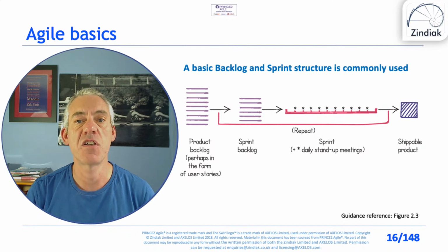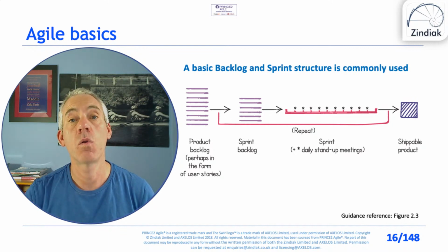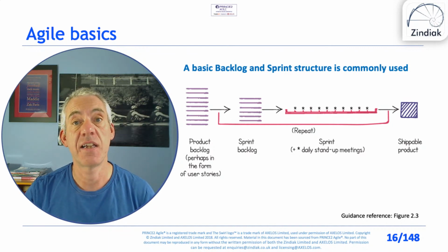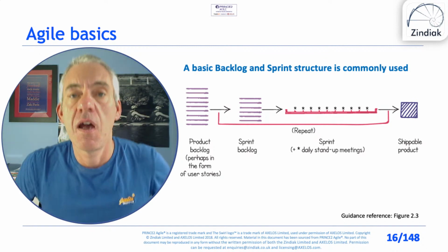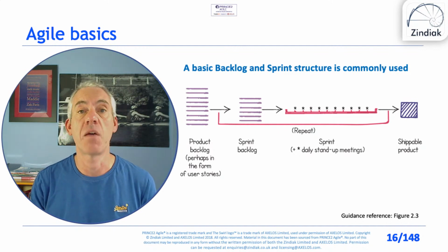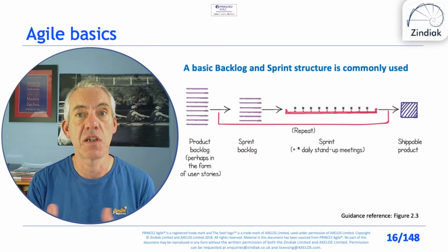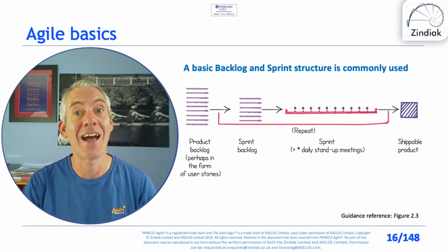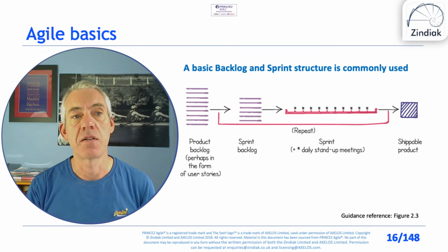And at the end of the sprint, we deliver a potentially shippable product increment, and the goal should always be to actually deliver it. There may be reasons why we can't, and often that's because the overhead of delivery is too great. That's one of the things DevOps tries to address: reducing the overhead of delivery so that we can actually deliver at the end of every sprint.